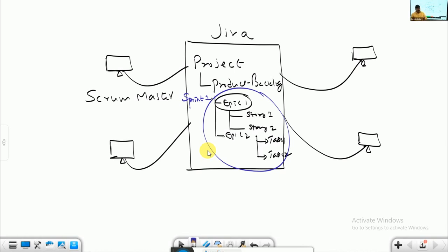The BA organizes a meeting. Explains the requirements planned to implement in the current schedule to the development team and QA team in the Scrum meeting. 2 major business requirements are planned to develop and test in schedule 1, sprint 1. Once the sprint planning is done, BA will give the KT about these 2 requirements to the team members, developers and testers. Answer their questions, clarify their doubts.